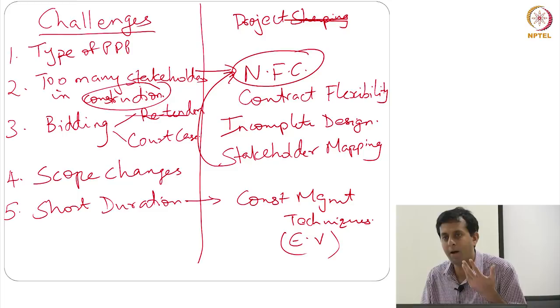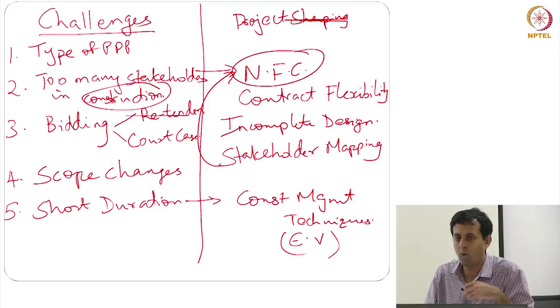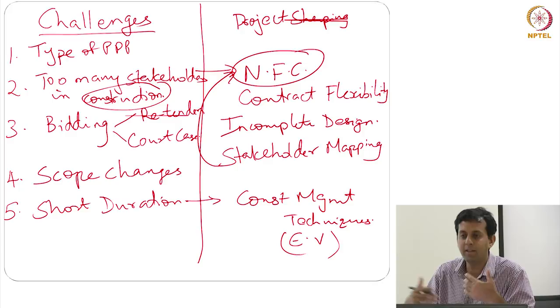Right. So if you can apply your mind and say, yes, the electricity department might not give me, or the highways department may not give me a planning permission, and therefore I need to bring them into a facilitation committee. Why aren't you thinking the same way about the ERA or about the CAG, saying at some point, based on transparency, these people are likely to audit my project and ask questions. Right. So I'm not saying bring them on, because the whole point of CAG is arm's length away. That's what maintains the neutrality. But do you have a strategy where what you're doing is far more transparent, so that they ask fewer questions?